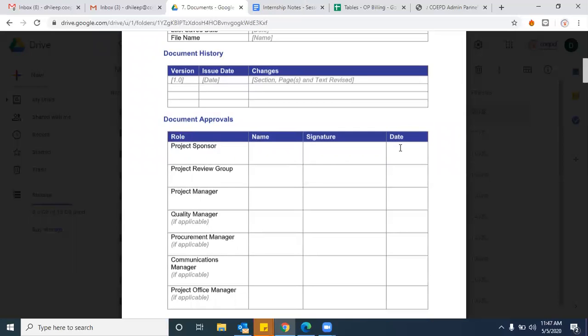This is very, very important in our BA role, because later on, if something happens all of a sudden, ultimately people will throw the blame on us, right? So we need to have valid proof of when it was approved. Without any approval, you can't proceed to the next level. That's the reason I'm sticking on that. Until this document is approved, and the signature and the date are in this document, you can't work on the BRD, and you can't say you already approved. You should show them proof that on this date you approved. That's the reason I started working on the next levels.